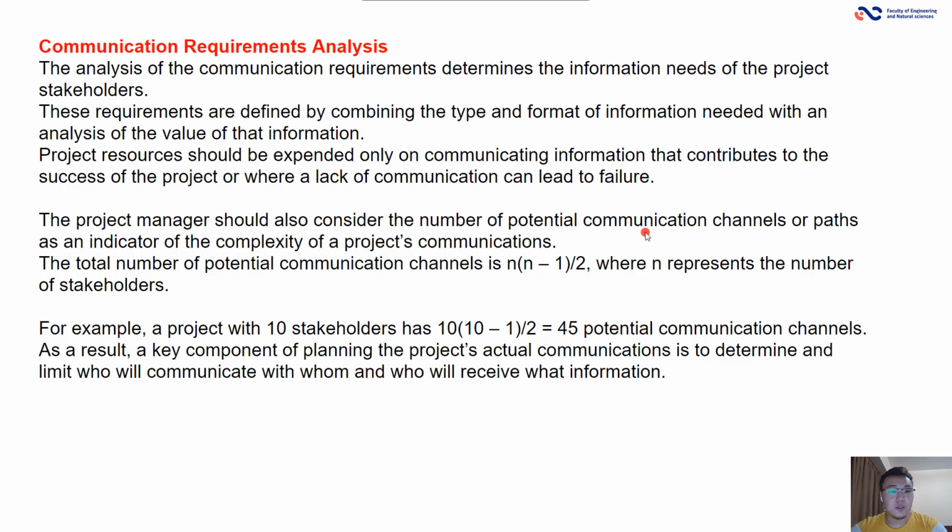The project manager should also consider the number of potential communication channels or paths as an indicator of the complexity of a project's communications. The total number of potential communication channels is n(n-1)/2, where n represents the number of stakeholders. Here is an example.